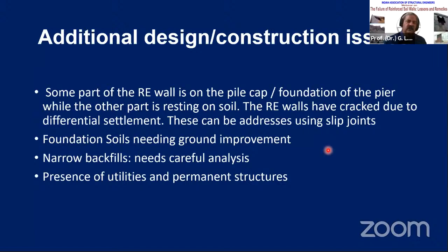And in some cases I know that ground improvement is not done properly. If it is not done properly, definitely the geosynthetic soil structure, being a flexible structure, tolerates deformation, but not beyond a point. So it can lead to a lot of problems. We have seen many cases where, once you suggest that it needs some improvement, they will not come back because it is not quoted in the work.